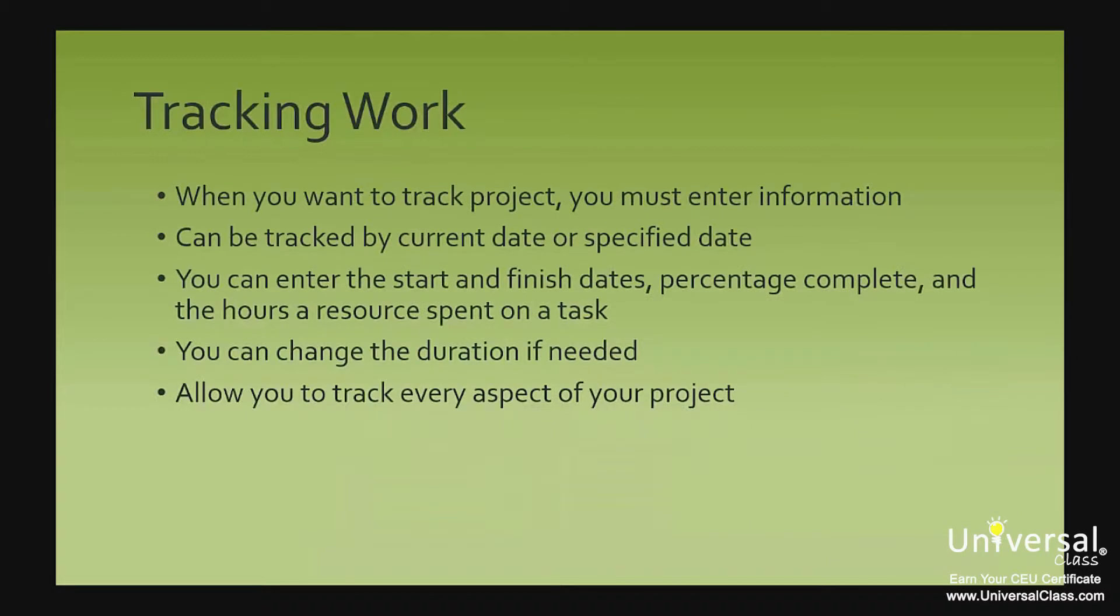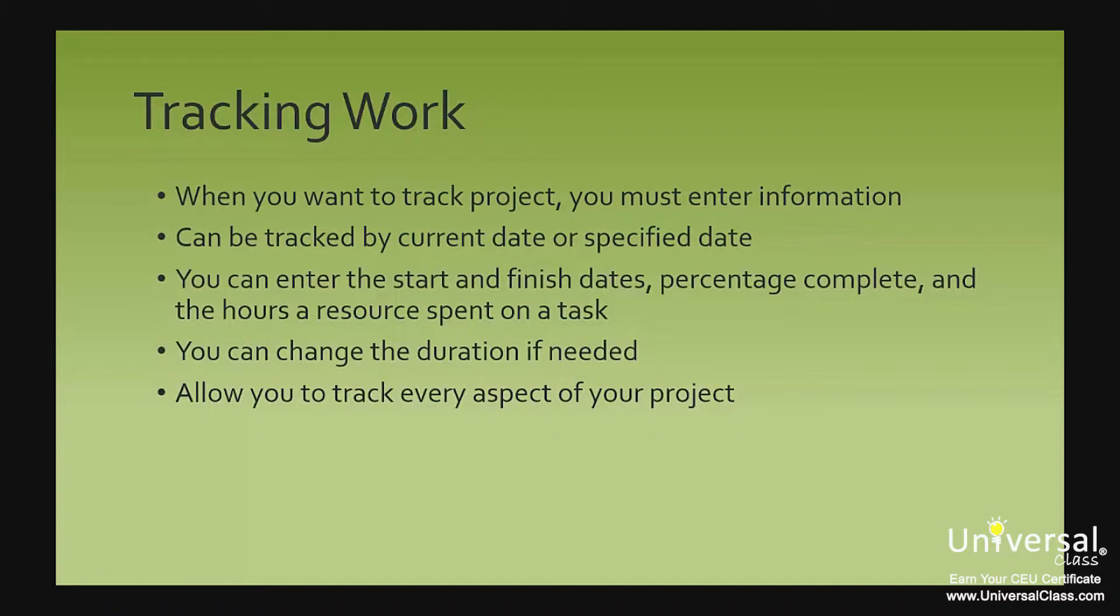When you want to track the progress being made on a project, you must enter different kinds of information. You must tell Project 2013 when you want to track progress. You can track by your computer's current date and time, but you can also do it by a specified date, such as the end of the month.